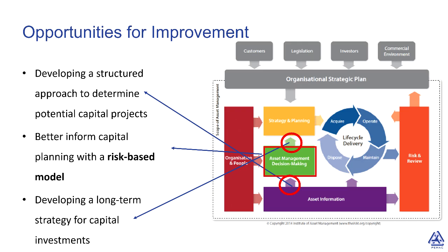And where we can make improvements is number one is that we can have a more structured approach for identifying capital projects. It's not just a wish list, but perhaps we can look at our maintenance records, we can look at our asset inventory, and be more strategic about it. Number two, we can use a risk-based approach to our capital planning. So it's not one long wish list, but it is a very sequential, targeted list of projects and having an understanding of what we're doing long term.